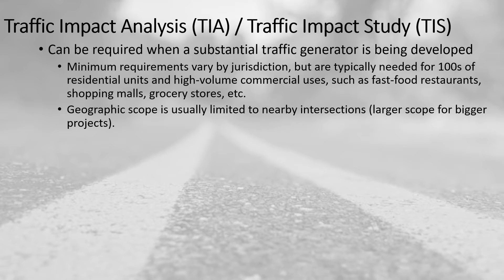For a small project, you may only look at one or two nearby intersections, but for a large development, it may be a mile or two in radius that you look at for the potential impacts.